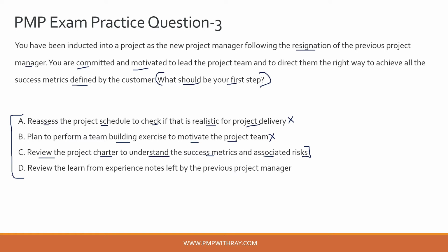So let's see. Option D, review the learn from experience notes left by the previous project manager. Again, this is not the first thing you do when you get inducted into a project, because logically speaking, guys, if you don't understand the scope of the project, you don't understand what the project is actually planning to deliver, the final product of the project, it is futile to start with learn from experience of the previous project manager, because you will be missing the whole context. So again, you are jumping steps, which you shouldn't do as a good project manager, and that is the whole essence of sequence frameworks.